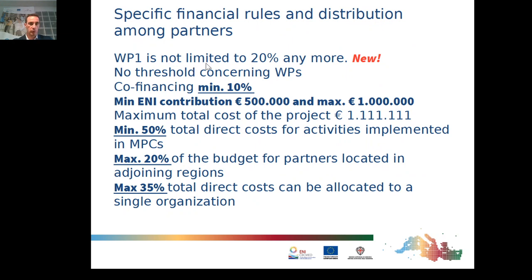More specific financial rules and distribution among partners. Work package 1 is not limited to 20% anymore. This is also important to remind. No other threshold concerning work packages. Co-financing is limited to a minimum. Well, the minimum co-financing is 10%. We cannot talk of a limit in this case. You can bring more than 10%. 10% is the minimum co-financing at project level.